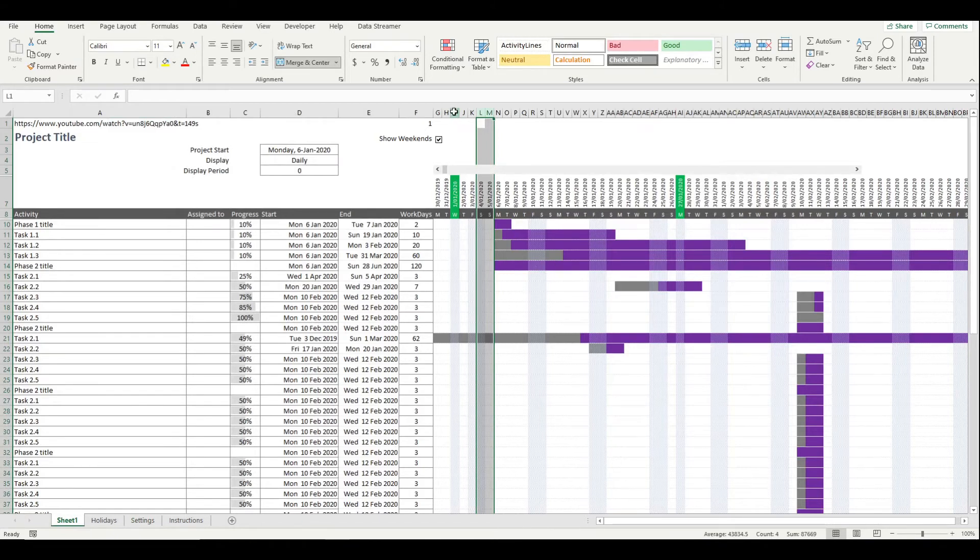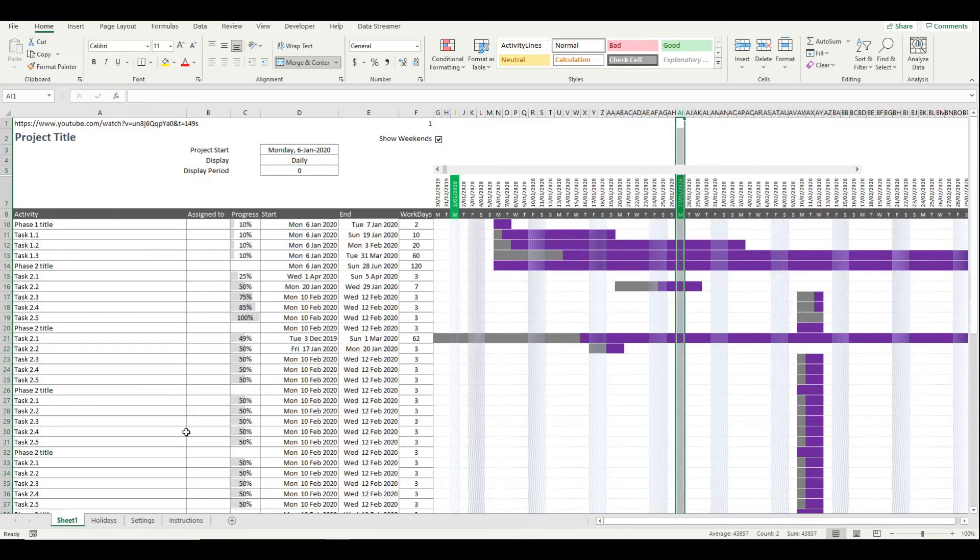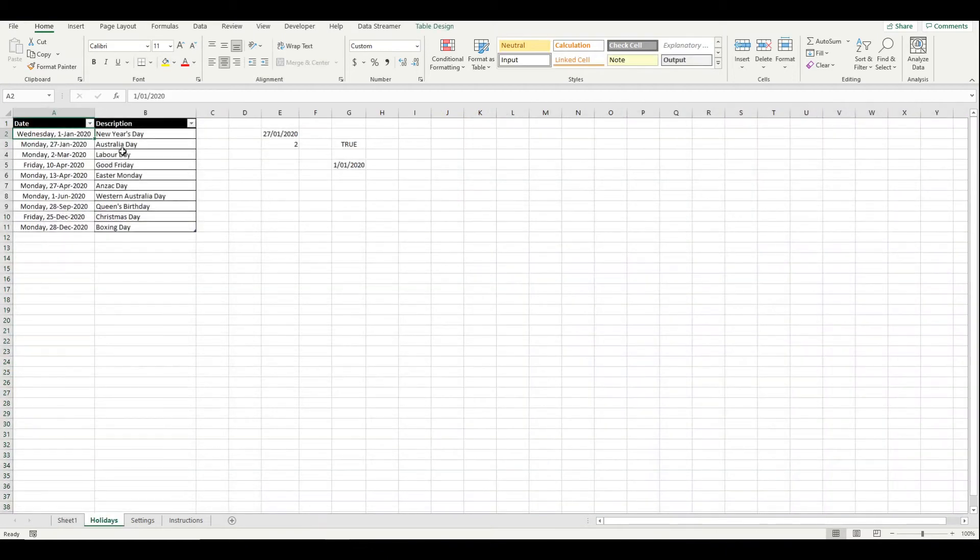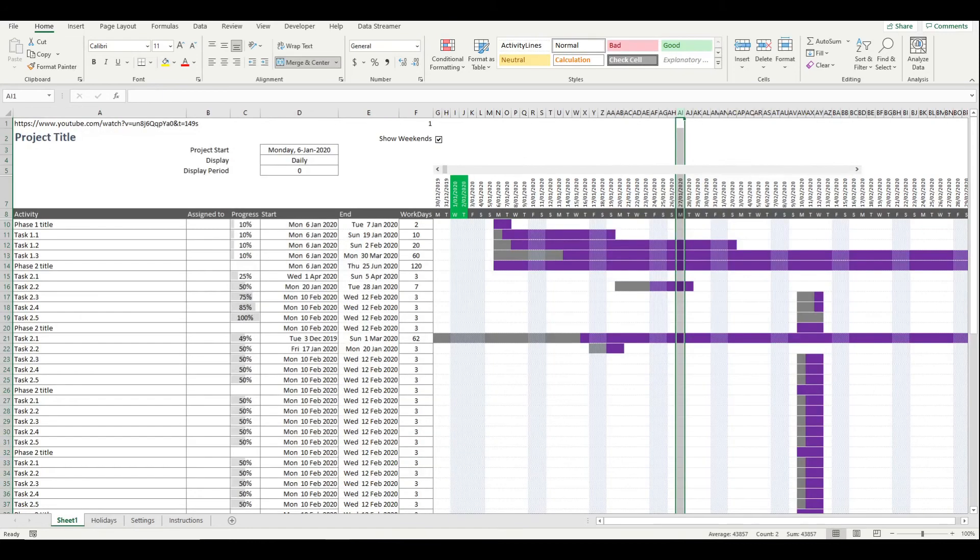Similarly you can also include specialized holiday days and it will display those on the chart. So if I wanted to have something on the 2nd of January for example, I could do that and then it's going to show up here.